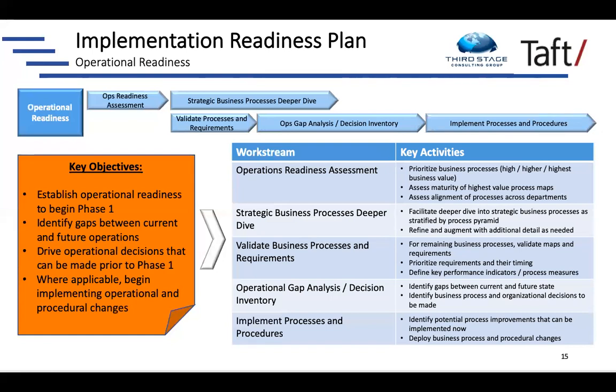Now, typically with business processes, we'll segment or bifurcate the processes into two buckets. One bucket being those strategic processes that really are differentiators for us. It might involve our secret sauce, our customer-facing types of processes, anything related to the customer journey, customer experience. Those might be examples of areas that are high priority strategic items where we're going to spend more time defining what we want those processes to look like so that those processes are driving how D365 gets deployed.